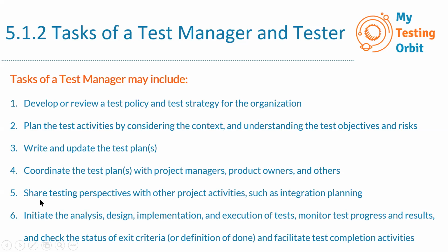Number 5 is share testing perspectives with other project activities such as integration planning. Sometimes when we work on a test plan, there are different ways of working on it. There can be one test plan for the entire project, which is sometimes also referred to as a master test plan.